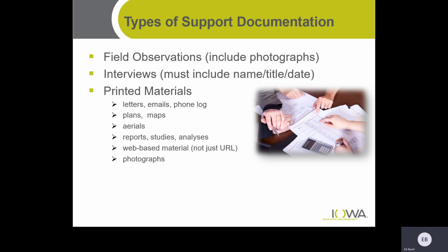So support documentation: when I was doing environmentals, I did always go out to the field and make my own observations, see it for myself with my own eyes. That's very helpful. I would always encourage that. You can interview engineers, architects, city officials, whoever, to get information. And you certainly can use and upload printed materials, letters and emails, even phone logs, maps, aerials. Maps are great. I really like to see those included whenever you can.